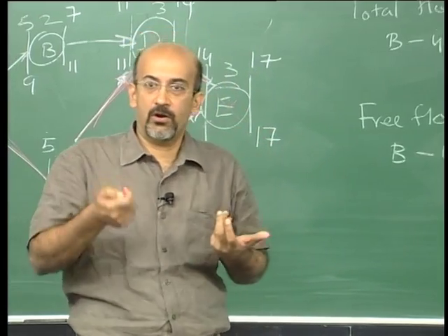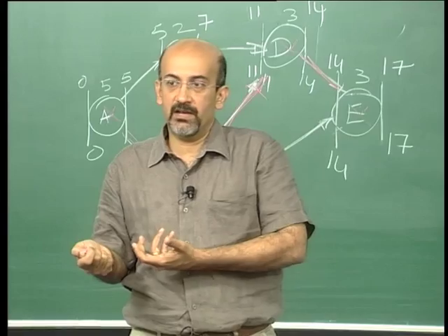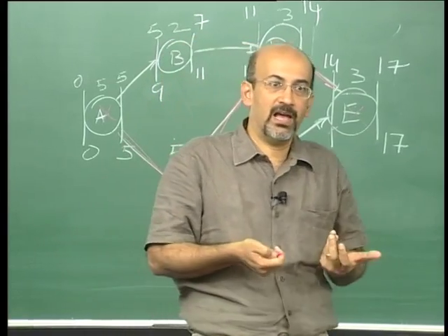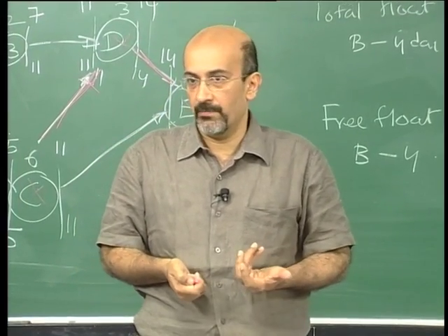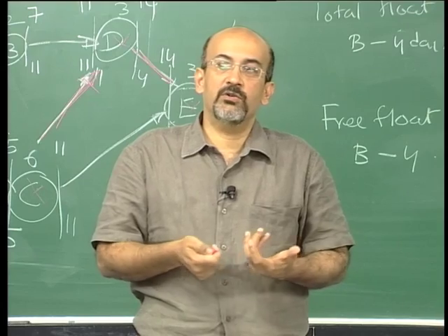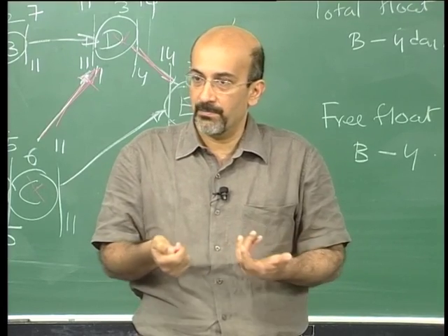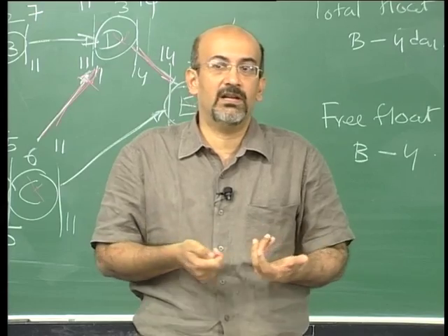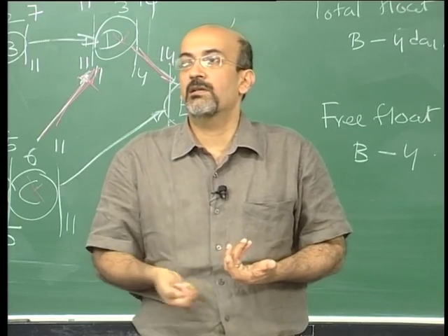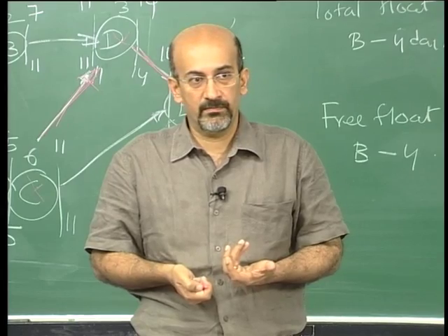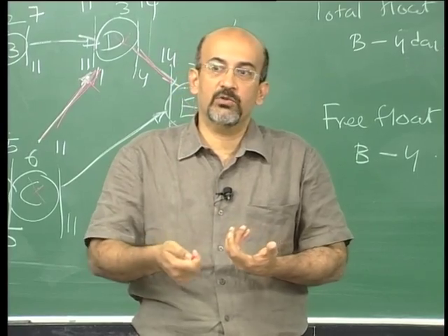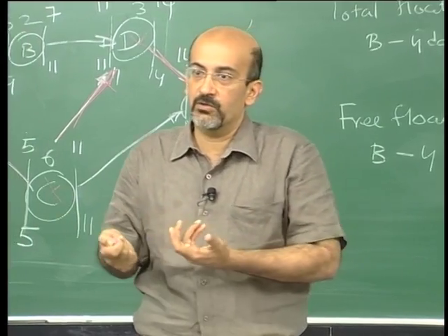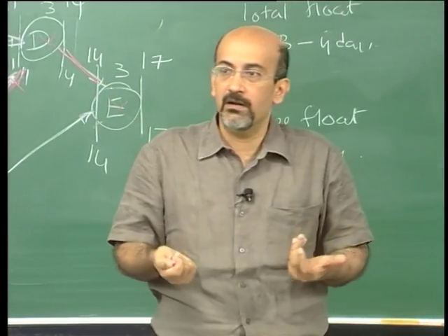Right. So they are all under clauses to say if there is delay and they are doing something, they might be liable to pay some damages, etc. They will want to use that 1 day, or they will want to increase the duration of their sub activity, because increasing duration will require them to mobilize fewer resources. So they might decide, I want to stretch because I will mobilize fewer resources, I don't have to pay for additional resources on that, and I can finish it in that time and be done.